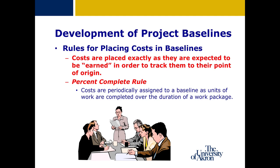The percent complete rule is key to calculating earned value. To be objective in determining percent completion on any given task, there must be some type of gauge — whether it's lines of code, bundles of shingles, etc., depending on the project. Another concept is that at around 80% to 90% complete, no additional earned value is added to a task until it's 100% complete. This addresses a common problem where tasks are reported as 99% complete week after week.